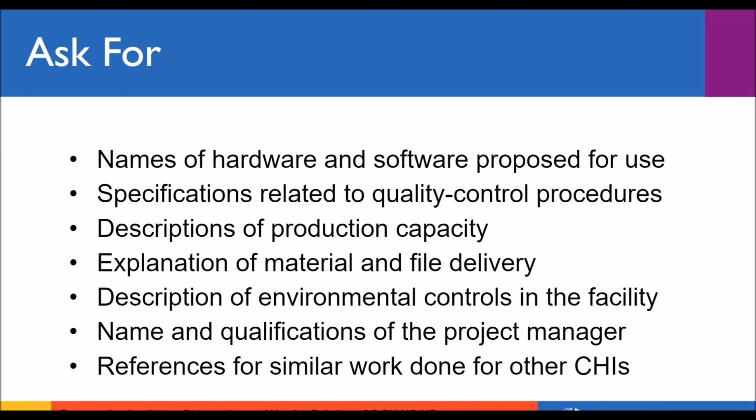Also, name and qualifications of the project manager. I'll say at least the project manager. It is not overstepping to ask for CVs for the project manager and maybe any other leads that might be working on your project if there's several different formats or aspects to it. You'll also definitely be asking for references for similar work done at other libraries, archives, and museums. We'll talk again about references in a minute. But wait, there's more.